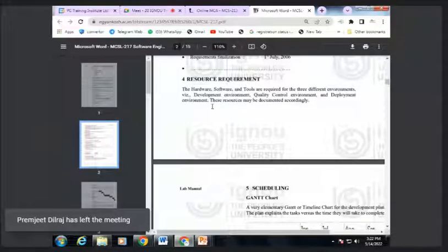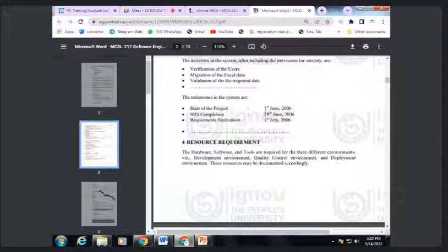Apart from this, another important thing is that whenever we are about to set the project start date and end date, have a flexibility of 20 to 30% margin, because we all are human beings, bounded by our personal commitments, and sometimes some health issues are also associated with some people in the team.